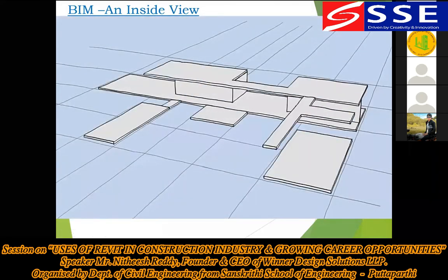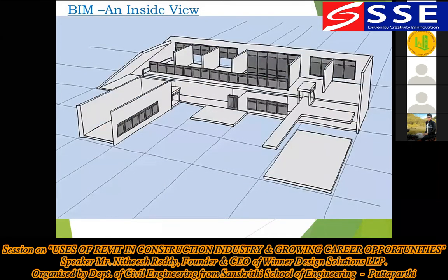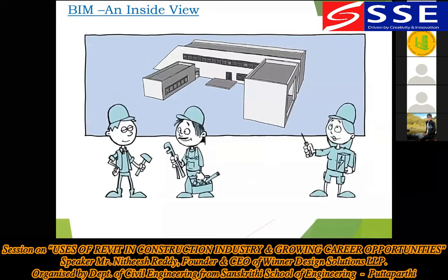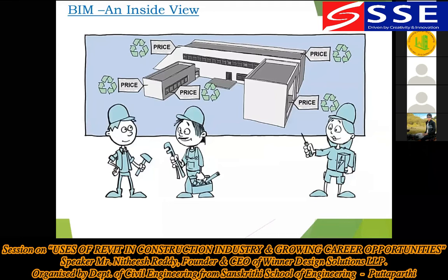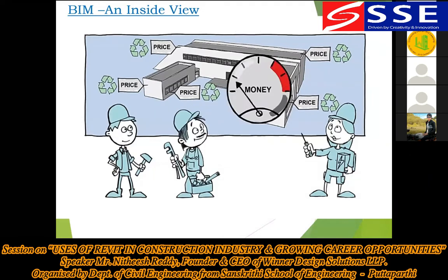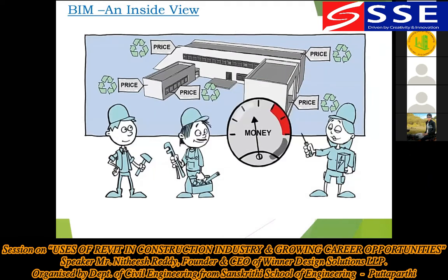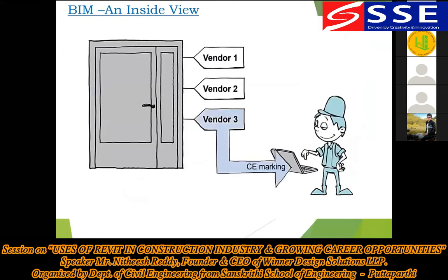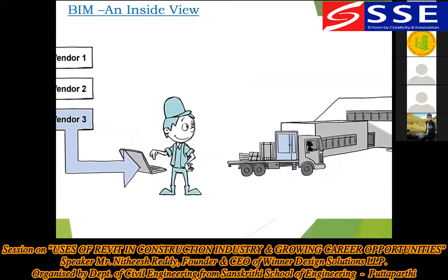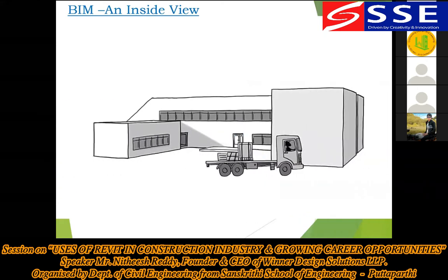The contractor uses the BIM to plan construction, to communicate with building product vendors to get quotes and environmental information on all the building components, including the door, and make their own cost estimation. The contractor accepts the best offer from the product vendors. Automatically, all product information is added to the BIM while the real door is transported to the building site.